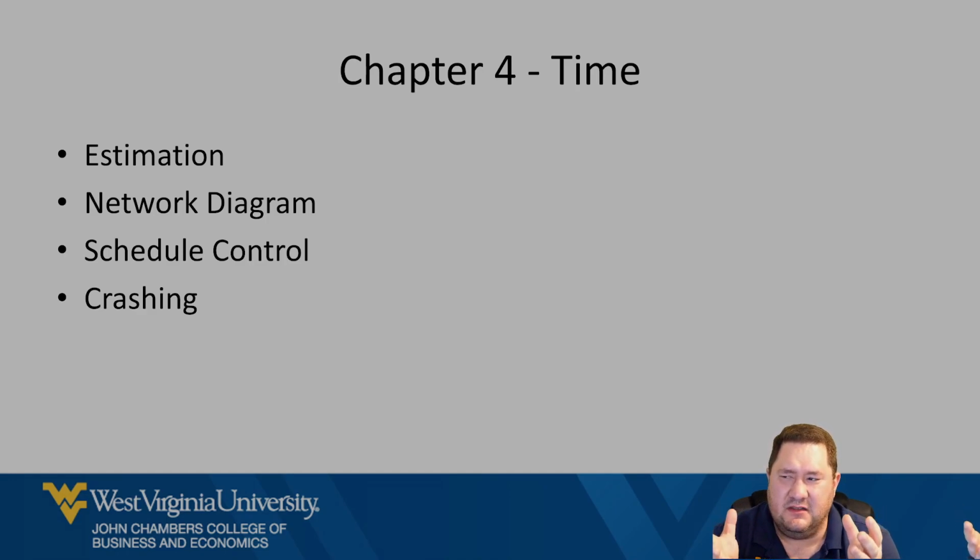Well, facilities might have been thinking of a smaller thing. So it's actually going to take 6 weeks. Well, we have to control our schedule. Is there something we can change in our schedule to stay with the same scheduled completion date? Or do we just have to push our scheduled completion date back? There's a lot of things we can do, and one of those is this thing called crashing.